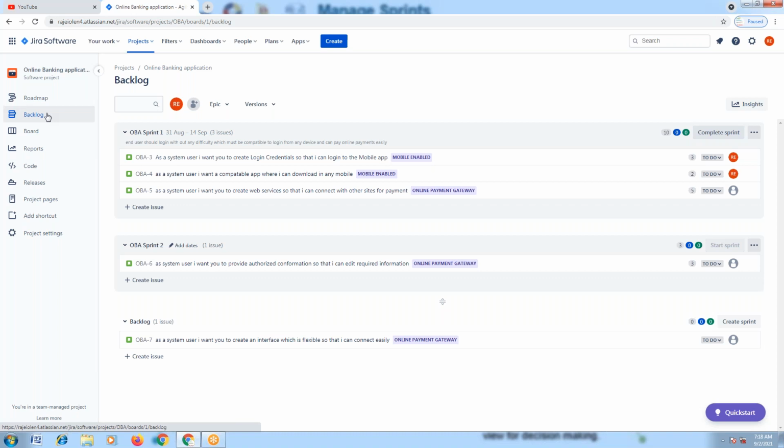Now, if the change is something inevitable, what are we going to do here? If the changes are inevitable, we'll ask the management team to write a user story separately, with the consent of team members, based on the necessity, and that will be transferred to the next sprint. This will be discussed in a separate meeting we conduct. It is not something like the daily scrum meeting, right?